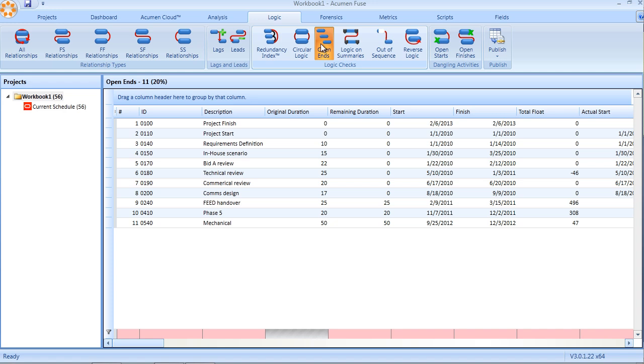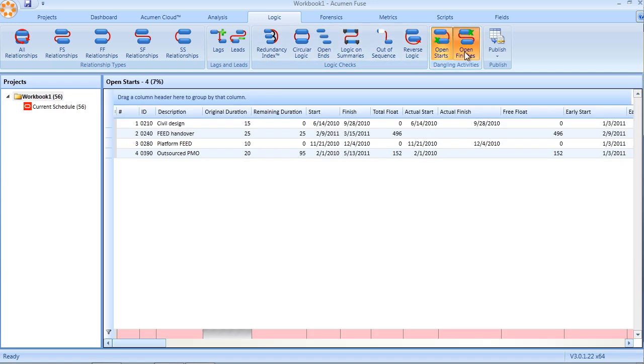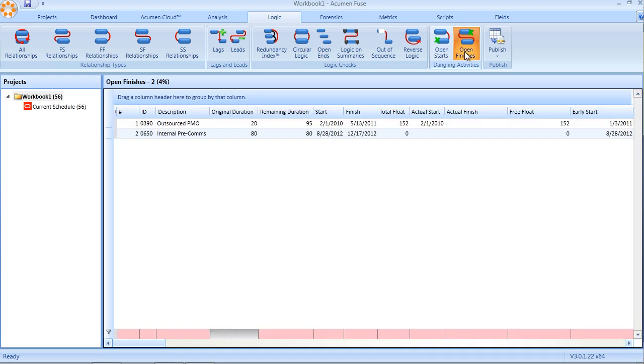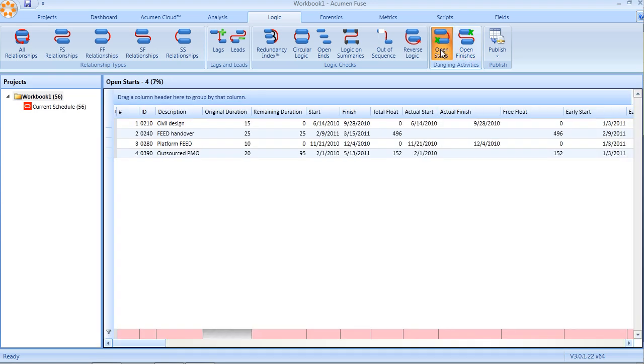There are two types of dangling activity. First, what we call open starts, and second, open finishes. Open starts occur when an activity may have a predecessor, but if that predecessor is tied to the finish of the activity rather than the start, the start is left open and dangling. It is a hidden open-end.